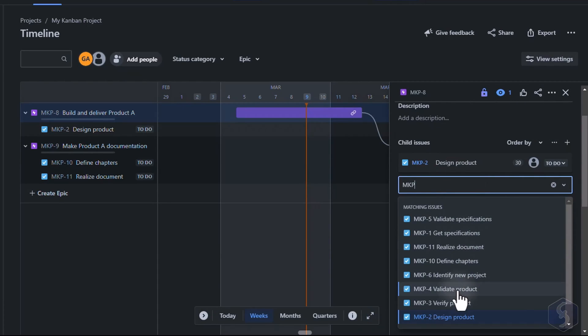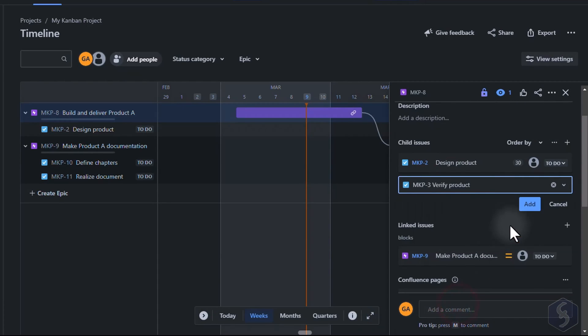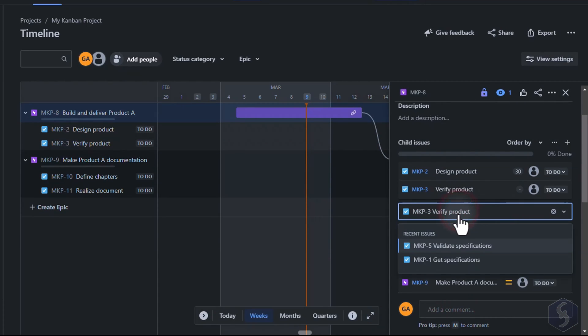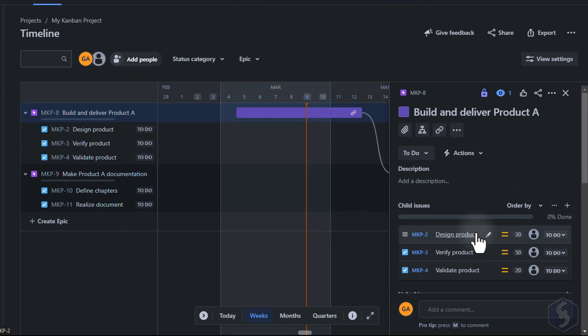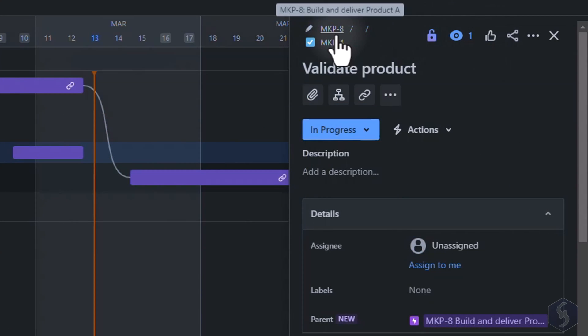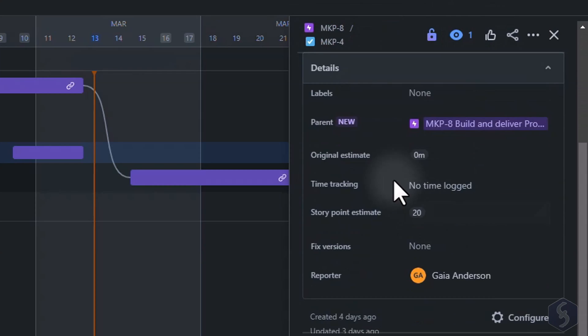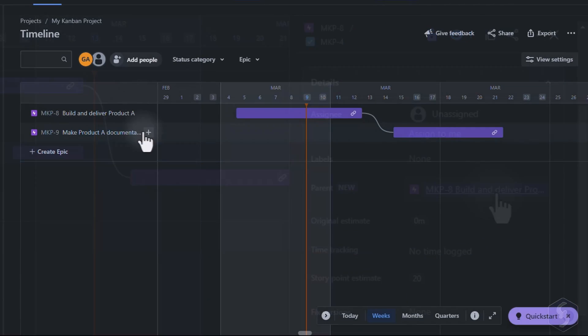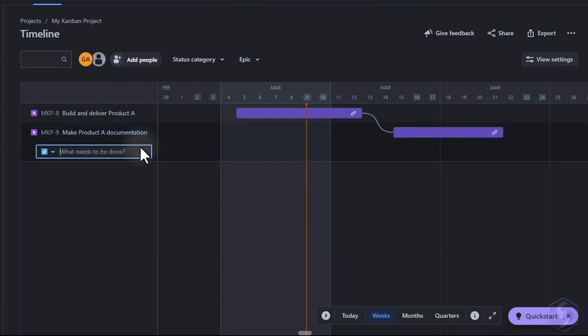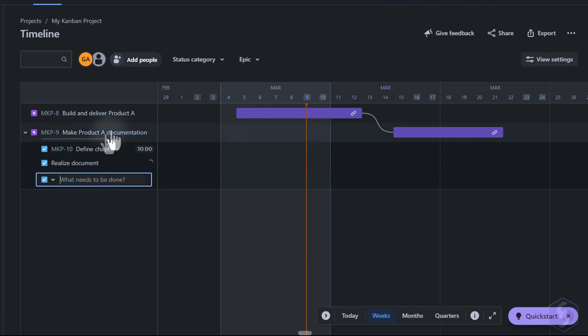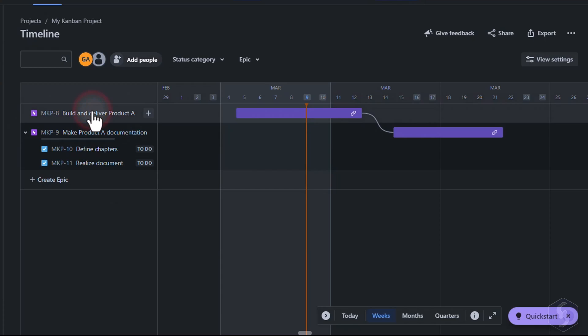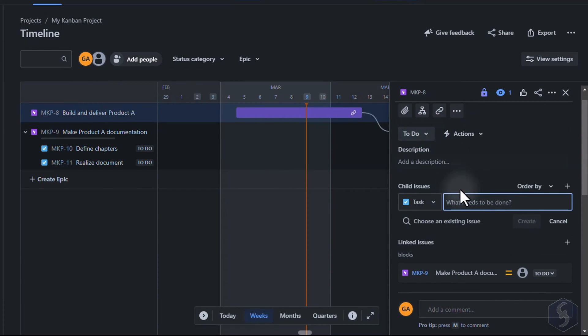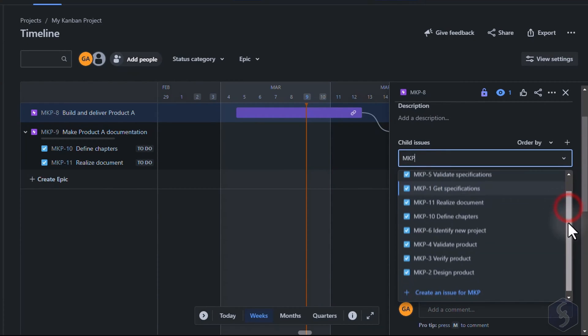You can also visualize all the issues contributing to an Epic goal on the timeline. In this case the Epic item is the parent task of the other child issues added within it. To add these use the plus button or open the Epic item and add a child issue as seen before.